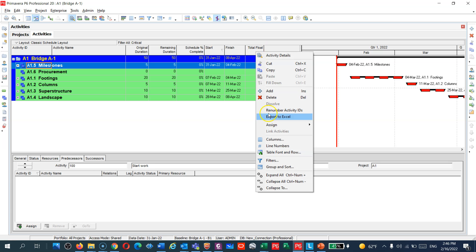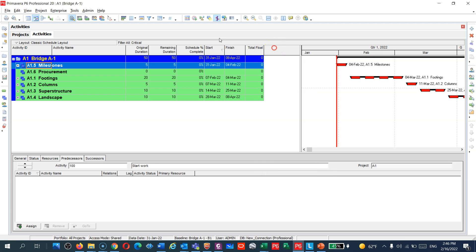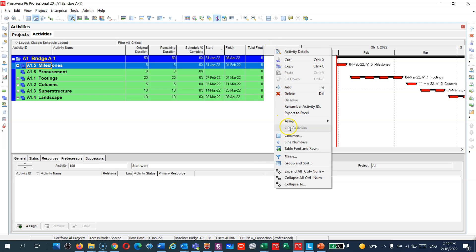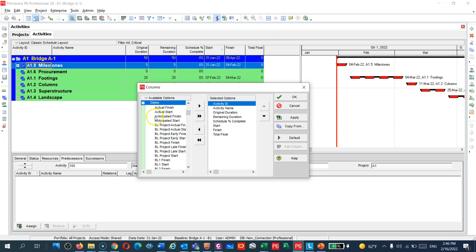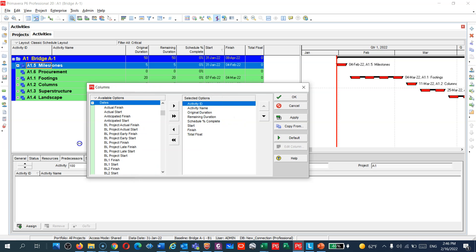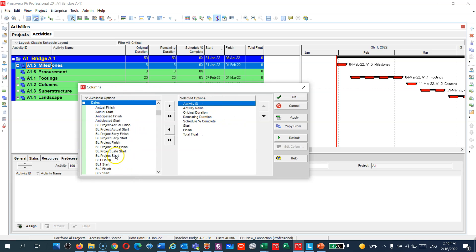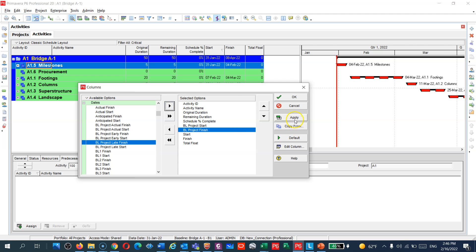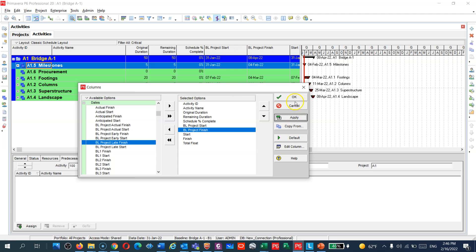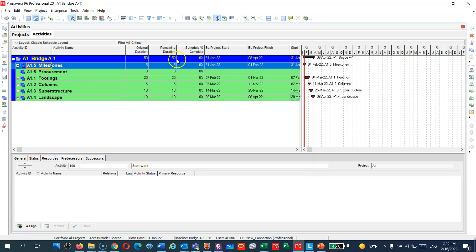You can see guys, we have maintained the baseline and then assigned the baseline. How to show the baseline dates? Go to column, right click here, column, and then you will go to date and you can choose what date you would like to show. I would choose baseline start and also baseline project finish. So now you have your dates, start and finish, and you have the baseline start and finish.